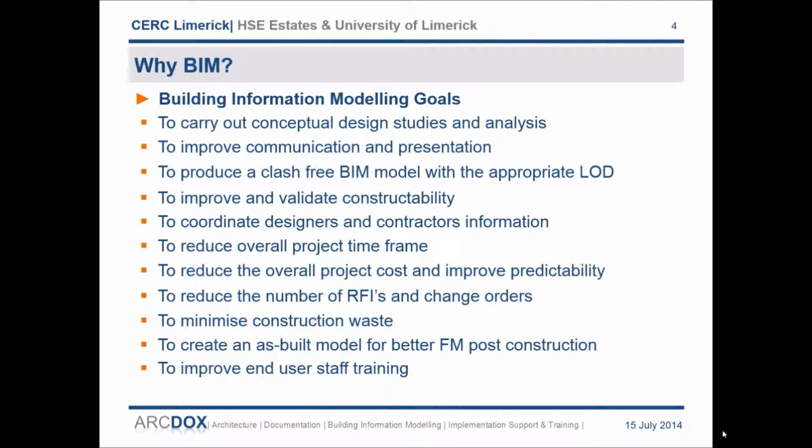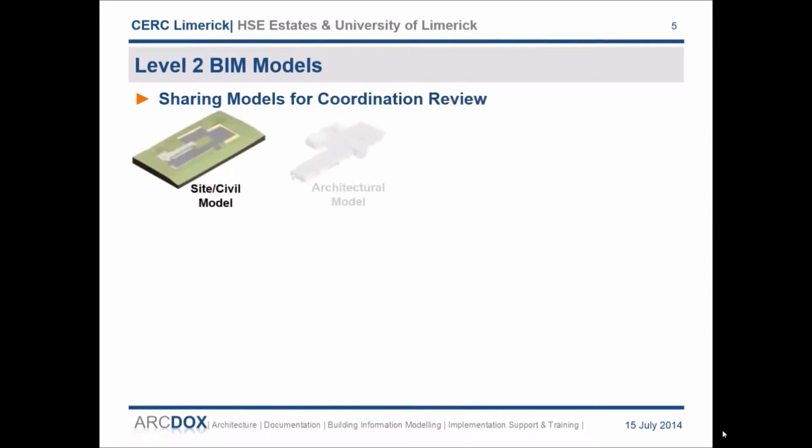They want to try and identify any issues early on in the virtual model and resolve these before carrying out the work on site. These could be design coordination issues or clashes, buildability or sequence issues, logistics and health and safety issues. The ultimate aim is to reduce the risk for all parties on the project and avoid unnecessary cost, overruns or delays. The project will be carried out to Level 2 BIM.